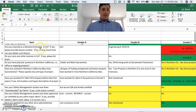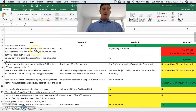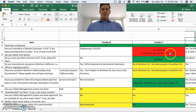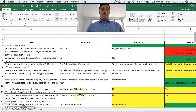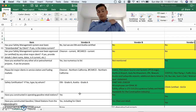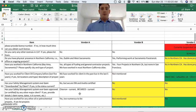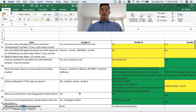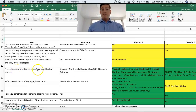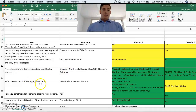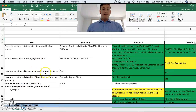Red obviously doesn't mean a good thing. For instance, to the question about licensing - one vendor has a license but it's currently suspended as of 11/5/18 - that's red, an automatic no-go. Vendors with no highlighting did not stand out. Green means very well qualified and yellow is in between. We're also looking at major clients and the service station and filling markets to check for overlap with clients we've worked with. Safety certifications are pretty much a requirement, and whether they have constructed and operated gasoline retail stations.